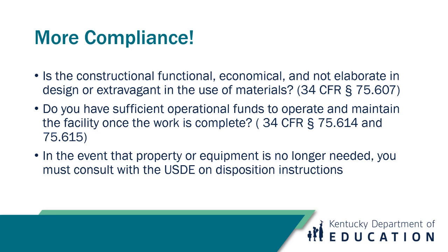I don't think you can say, we're just going to pay for the equipment and that's it, because there's additional cost with that. Obviously, installation, there's ceiling tiles, you might have to move ductwork. Electrical work is another one. You may have to upgrade your electric as well to get a new system to work. So when in doubt, if you're not quite sure, let me know, and I'll be glad to pre-float that upstairs with the folks that we're talking to and see what their thoughts are. The devil's really in the details on this. That's one thing we've learned pretty quickly, and that's why we may ask some dumb questions. You'll have to pardon us, but we want to know exactly what we're looking at and not assume anything. Hopefully that helps answer your question.